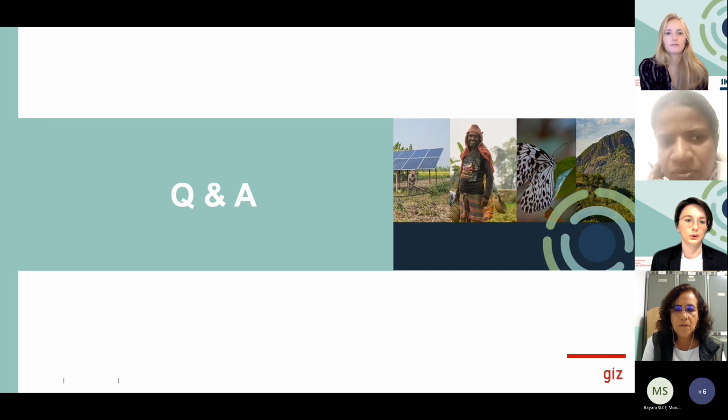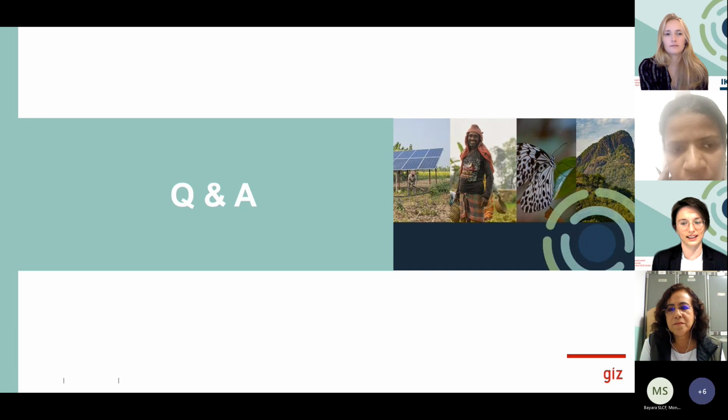And if you say you conduct trainings because you want to increase the capacity or the knowledge of your target group, then measuring the number of people who have attended X number of trainings doesn't really tell you something about the increase in the knowledge. This is only hinting in the direction. And it's up to you to decide if this is what you want to measure. Of course, it is easier for you as a project to count the number of events or the number of participants. And of course, it kind of reveals that people have been trained, but it doesn't say anything at all about the knowledge level. So it's just a tool to help you. So don't get stressed about the numbers. They are not everything.